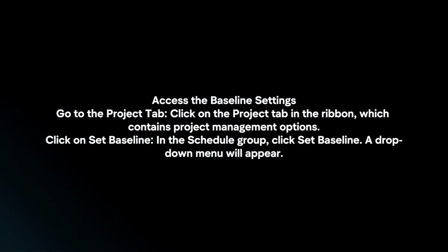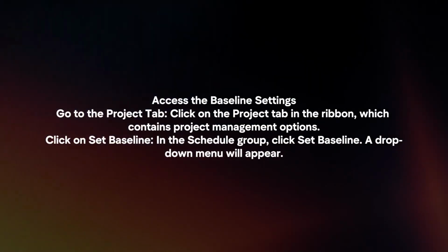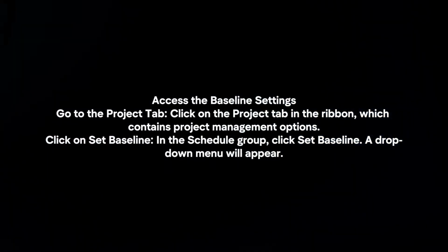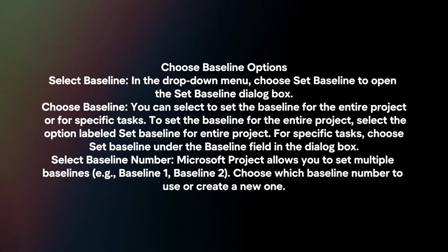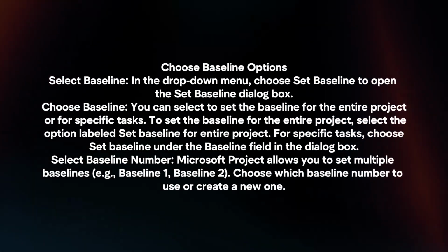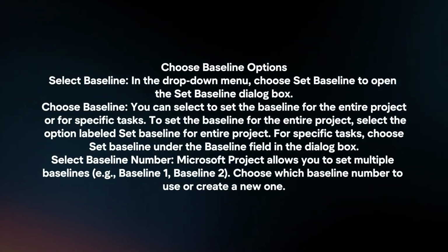Click on Set Baseline. In the Schedule group, click Set Baseline. A drop-down menu will appear. Choose Baseline options. Select Baseline. In the drop-down menu, choose Set Baseline to open the Set Baseline dialog box.